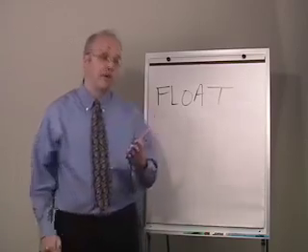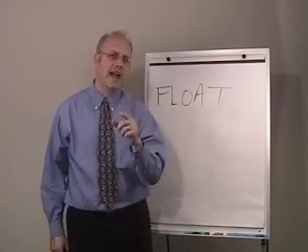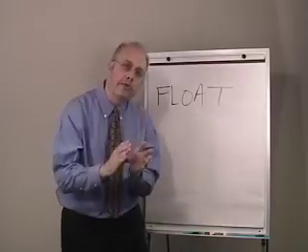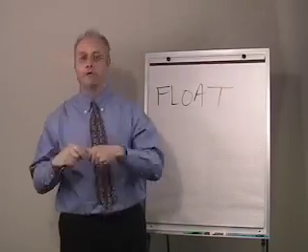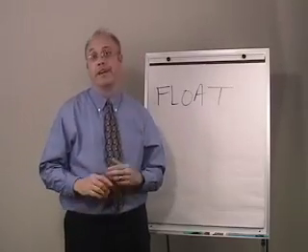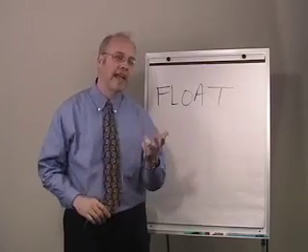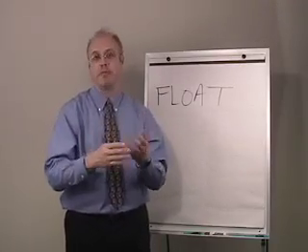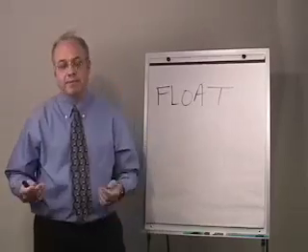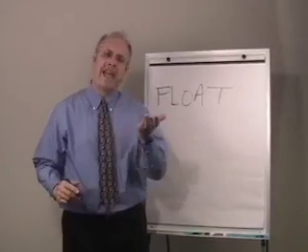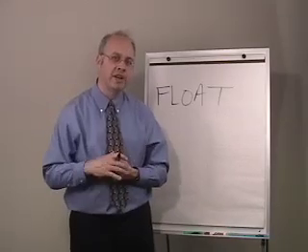However, there are contract provisions out there that specifically say that if one party creates float, that float belongs to them. So if float is created on a path by a party's actions, or inactions, I guess, but probably more likely actions, that float belongs to that party for the remainder of the project. So you end up having to set up a little bit of an accounting system during the course of the project.